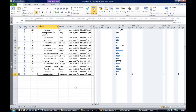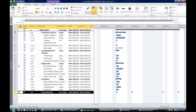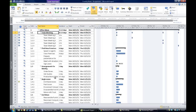You were also asked to move the team meeting to the top of the project. To move a recurring task, first minimize it, then highlight the row and wait for the four-arrow mouse cursor. Click and drag it to the top of the project — keep it under Office Move but above Premises. The team meeting now sits at the top of the project. That's point 9: entering a recurring task and moving it.